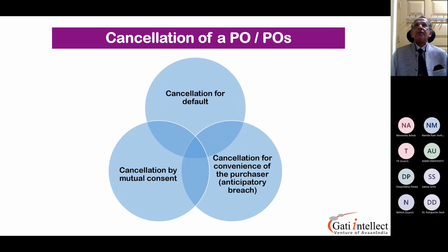You forfeit the right of enforcing the lead time promised. Got it? So what the court says is do not keep accepting these excuses, because if you keep accepting these excuses, it becomes a precedent in the law.